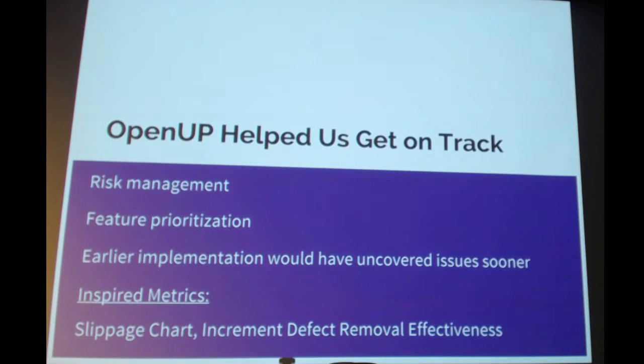And so what we did was we went back to the sponsor and we asked him to reprioritize these issues so that we could get a better idea of what was going to be most important to the system. And what fell out of this around week 7 or 8 was that we realized, all right, there's no way that this first iteration of the project can contain all of the architecturally significant things. So we're going to focus on services for now and leave out the blogging aspect.